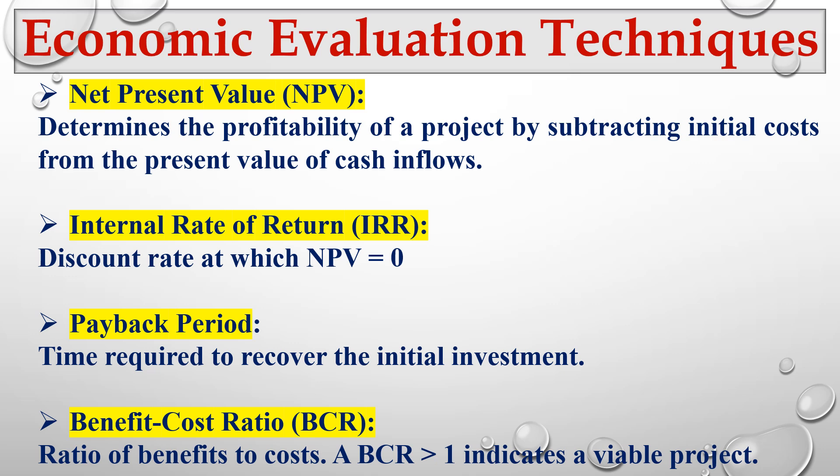Then there is the benefit-cost ratio (BCR) — the ratio of benefits to costs. If the BCR is greater than one, it indicates the project is profitable or viable. We already have videos on these indicators in our YouTube channel. We use these indicators in projects such as solar PV installations to support decision making.